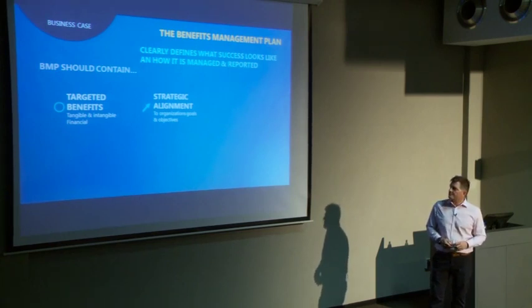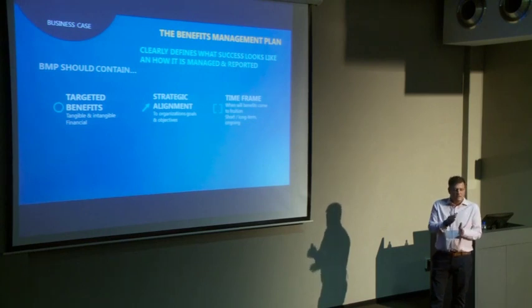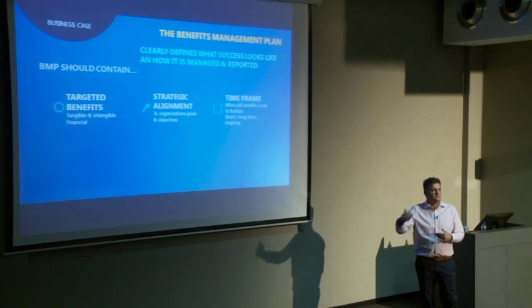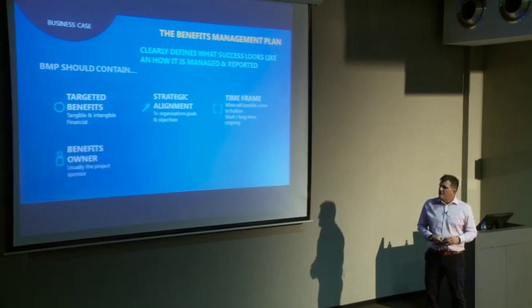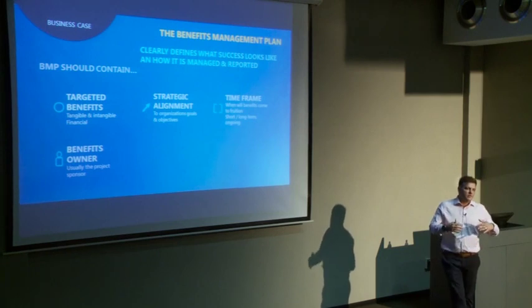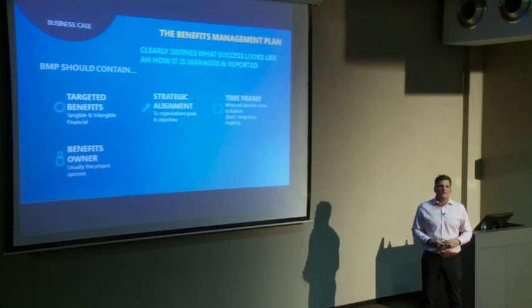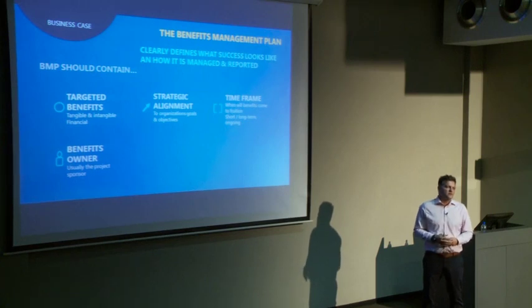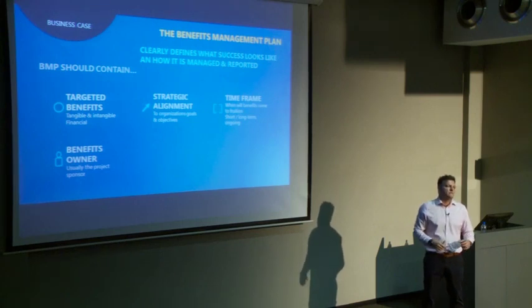Again, a lot of talk about that. What is the time frame to start seeing the return on these kinds of projects? It has to be clearly stated that our projects will give us this return in these expected time frames. And then really, who's the benefit owner? The benefit owner is not always going to be the project manager, but a project manager has to make sure that this document is in place, managed, and updated. Benefit owners are usually the functional managers in your business, because your project is creating something of value for them. So they have to really take ownership of realizing that value. It's usually the sponsor, who is usually a functional executive or functional head.